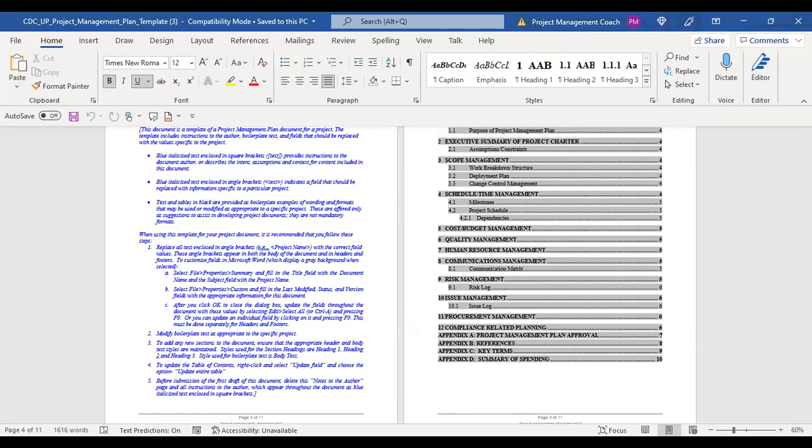One of the things we need to be aware of is this plan should be robust enough to respond to the ever-changing project environment. If you're talking about predictive projects, this must be robust enough. We're not looking to make it as big as possible just for size sake. No, we want to make it robust enough to cater to the ever-changing environment. All right. At the same time, we would like to make it concise. So depending on the effort you're working on, this could be really huge, could be in 50, 60, 100 pages. And a smaller project, it might be a 1-page or a 2-pager.